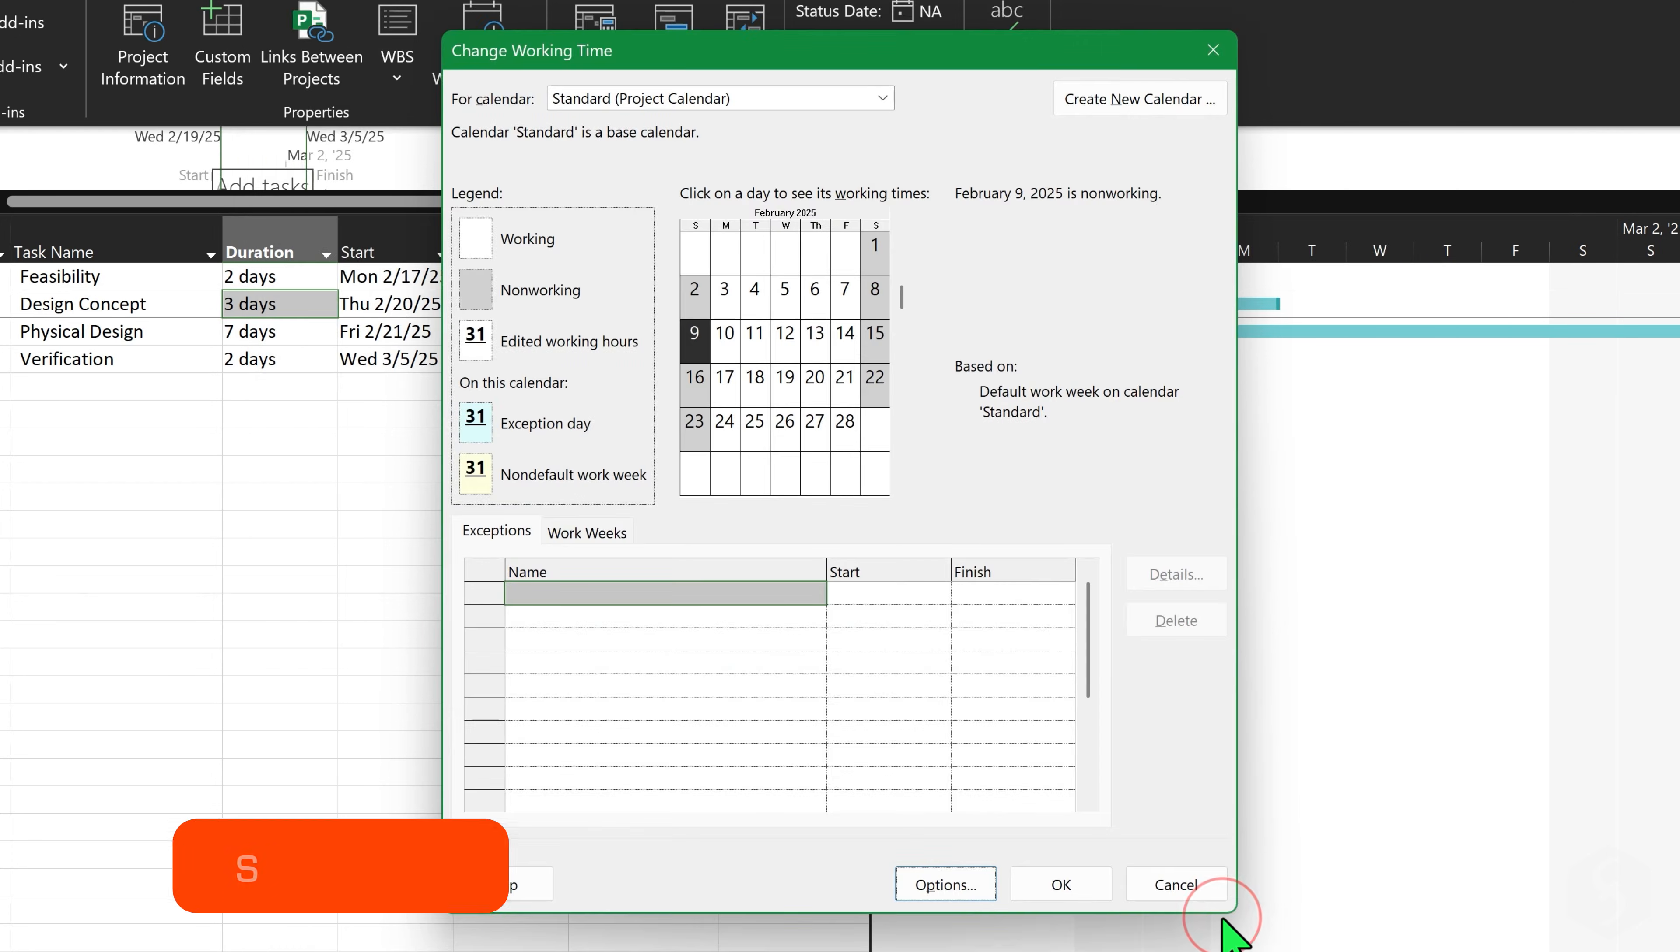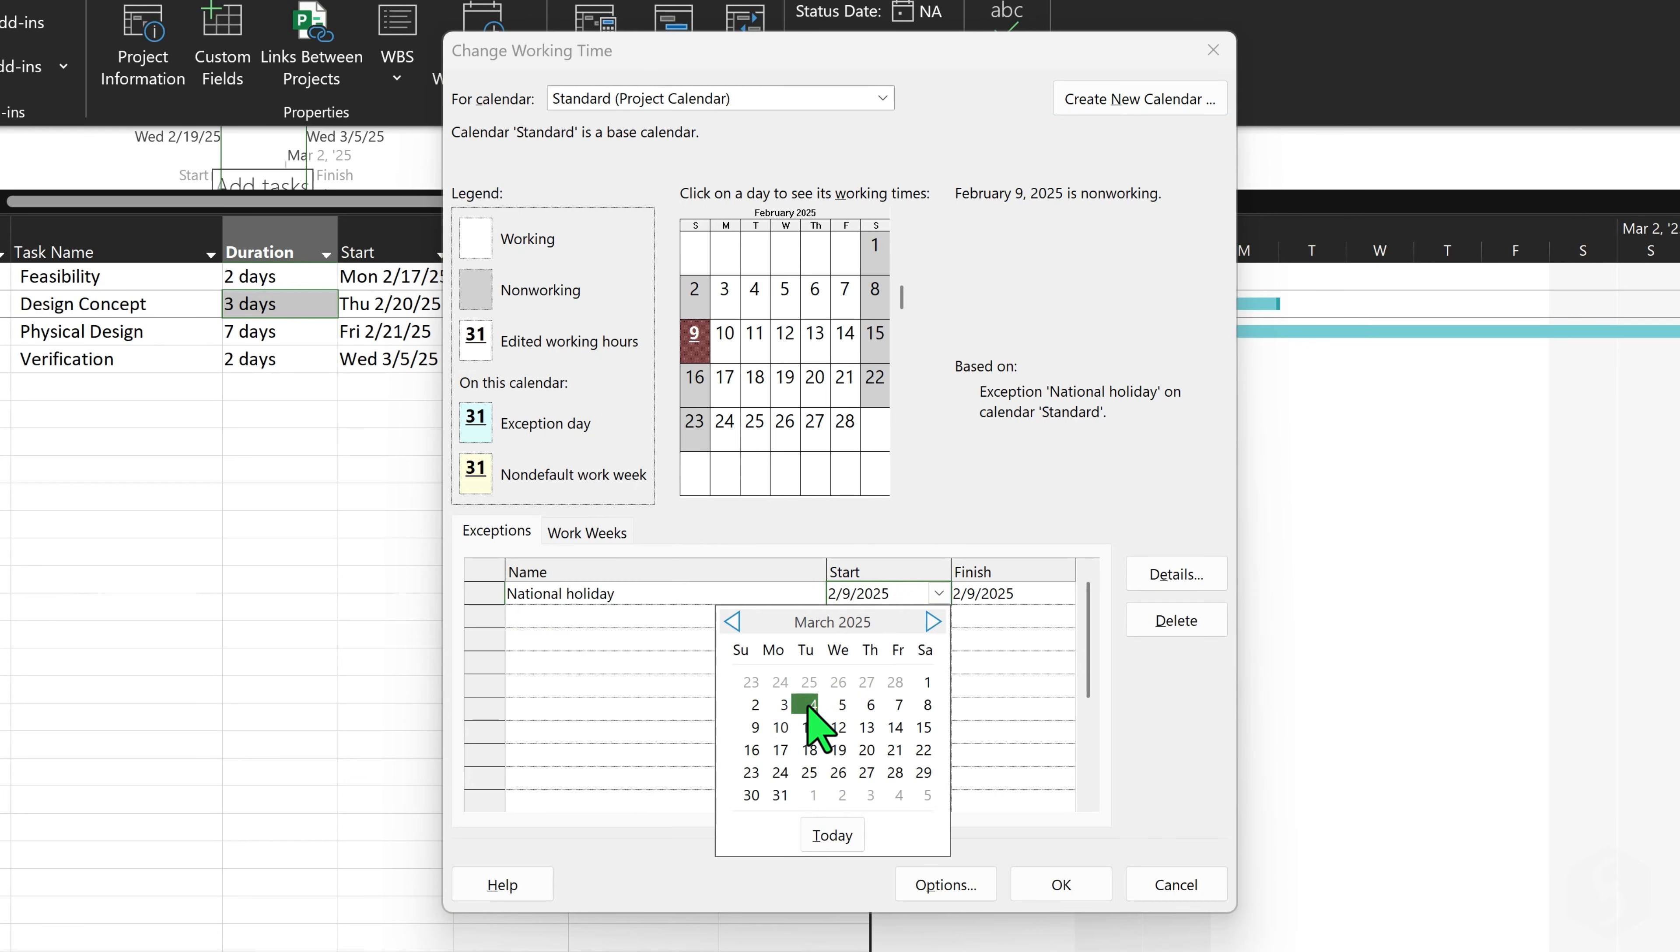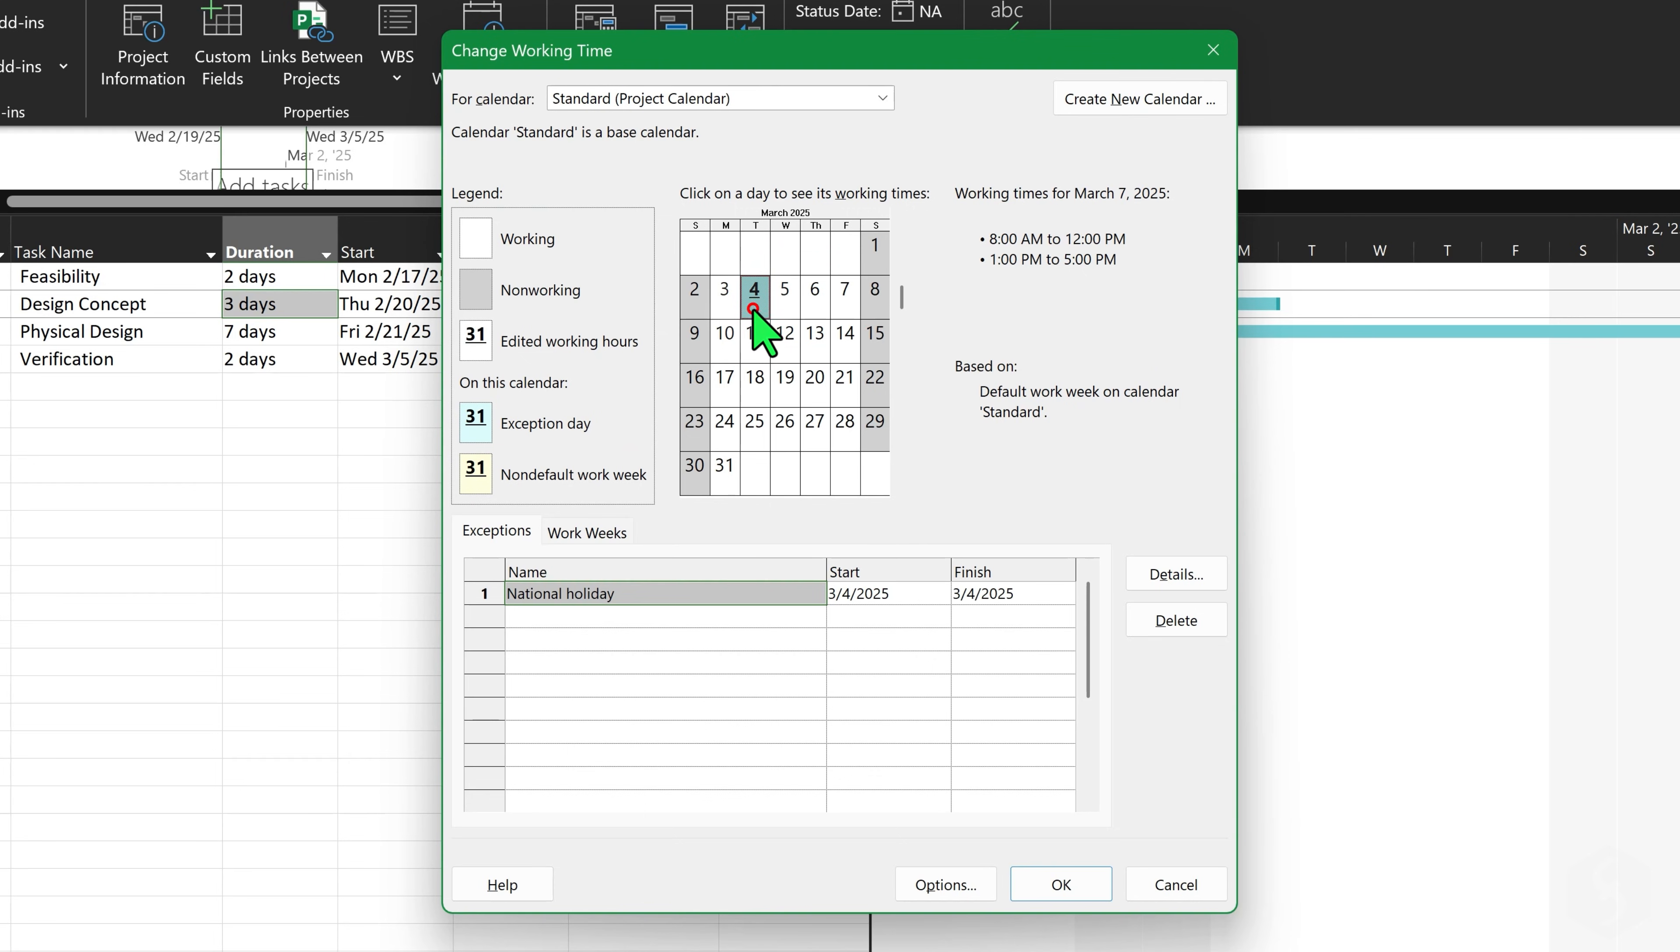Click on OK below to apply. At the bottom, under Exceptions, add specific dates for holidays or other events to be applied to your entire team. Double-click on any period to set it as non-working or define special working hours with any recurrence if needed. Go to OK to apply and check the rules by selecting any day on the calendar.